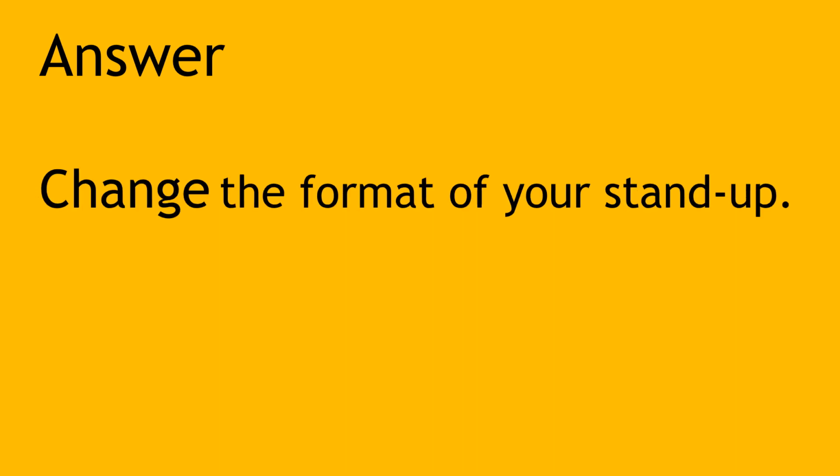The other thing which you can do is change the format of your stand up. It's a coordination and dependency planning meeting for the whole team. Consider having team members bring in an index card listing tasks, dependencies, and blockers for the current day. And do not open up the floor for anything that is not on a single side of an index card.